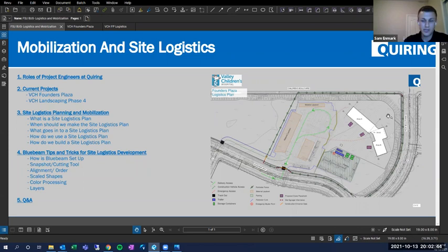I had a job down in Southern California where we had a tower crane that part of our logistics plan was we had to tie up every night so that it was pointed in a certain direction, because we had helicopter traffic landing on a helipad like 40 feet from the edge of our job site. So little things like that, putting together these plans, really bring out some of those questions.